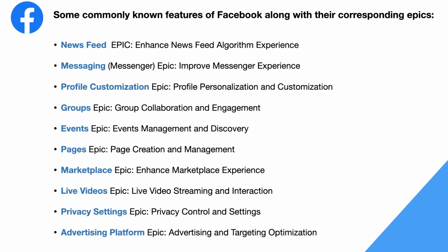So epics are simply these big features that cannot be completed within a sprint, and therefore must be broken down into user stories, right? So let's break down one epic and see what we get there. Profile customization is quite big. It cannot be completed within one sprint. It may even span more than one sprint. Okay, so let's see how we will do it.